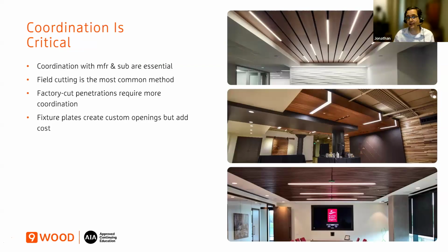definitely that needs to be coordinated, ideally in shop drawings and through the installation to make sure that things are correct. And you don't have situations like the sprinkler in the photo below that's meant to be centered and it's off to the right or something like that, which can happen. So lots of different options, but make sure the manufacturer can help provide a plan and the drawings you need to get the coordination with the lighting you're specifying and the drawings required for the acoustical sub to make sure it's done correctly to avoid those pitfalls and issues.